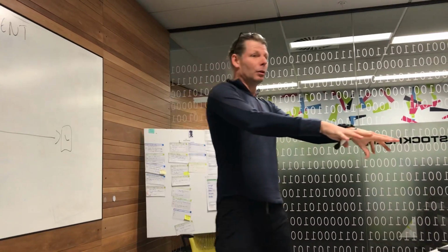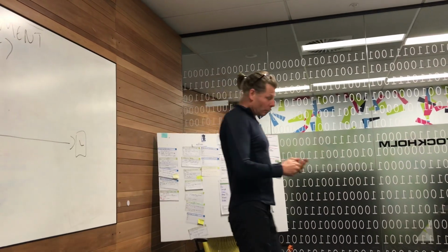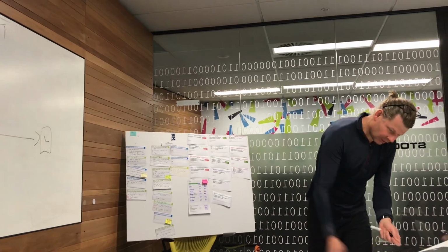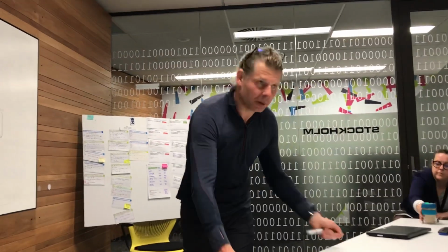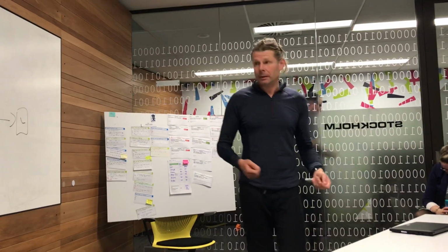After the 3 minutes, we go to the ones at the top. We clarify, have a quick discussion on these, then we distribute them again. So we'll end up with a sequence like this. And what you can do is you go, you know, this is actually larger than that, and this one is probably a bit up here. And we can just move along. And it's in silence, and it's really quick fire.